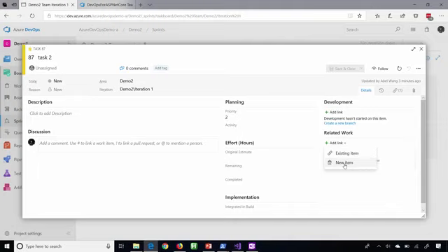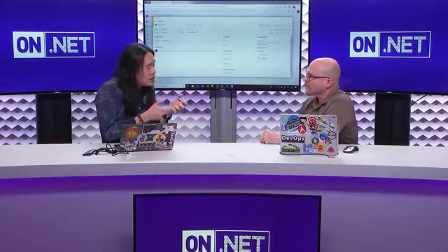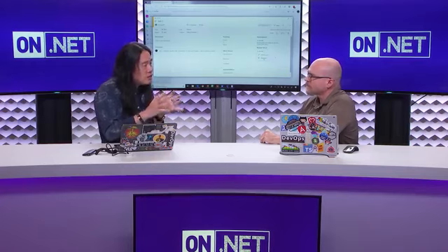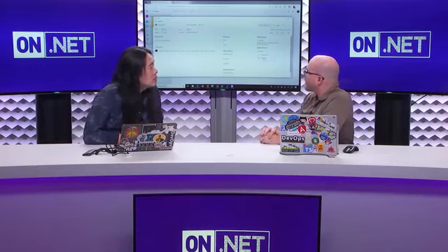As a developer, a lot of times when I first start my sprints, we break things down into user stories, and then when we have our first sprint planning meeting, I try to start estimating or breaking apart the user stories into tasks that I think I'll need to do to finish that particular user story. And then that gives me a pretty good idea of how long it's going to take for me to finish that user story. So how much flexibility do we have with this board?